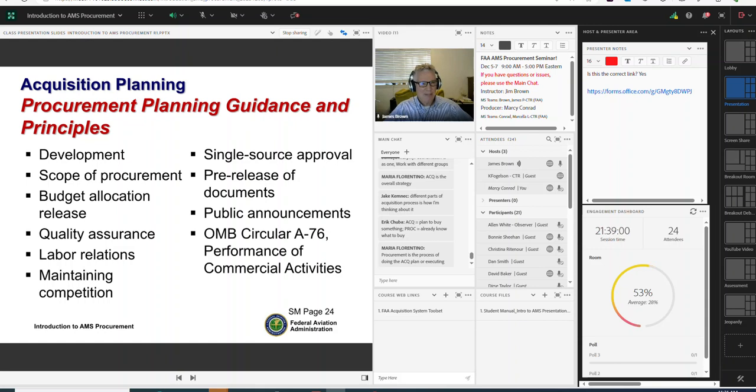Some of the methods of maintaining competition: multiple sourcing, obtaining reprocurement data or data rights. Open systems design is sometimes a way of encouraging competition. We need to determine whether the procurement should be competitive or single source. Again, it depends on the individual circumstances for the procurement.